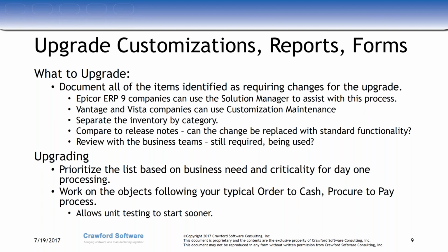So encapsulating allows me, instead of if I approach it from all customizations left to right across all areas of functionality, you might be in a situation where we did have one customer that the original estimates that we did as far as upgrading the amount of forms, customizations, and everything they did, we had 4 people dedicated to that effort, and it was about 6 weeks because it was a very highly customized system. And we took this approach of going module and functionality area by area so we could start getting user involvement as soon as possible. You want them to be champions for the project. You want them to be looking at Epicor 10. You want them to be excited about the upgrade and seeing some of the new features and functionality that's there.